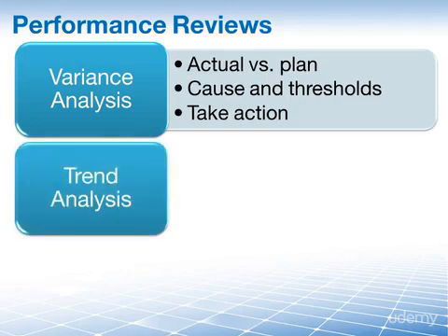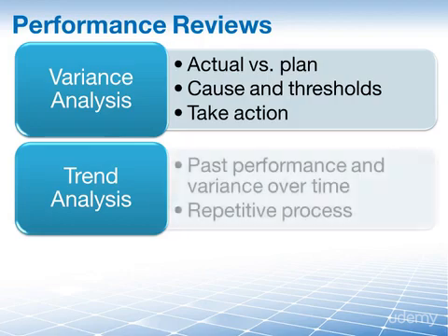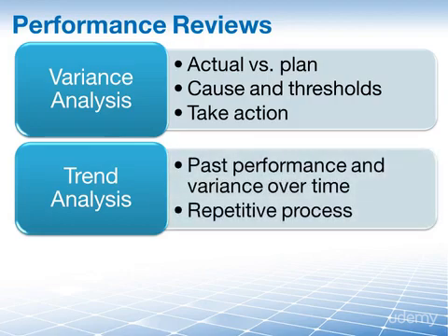As the name suggests, you will look at your past performance to determine what the future will look like, usually using graphical techniques of some kind. But you will also look at your variances over time. Remember that you don't do this process just once. You repeat it again and again. So you will have a list of variances from last week, 2 weeks ago, 3 weeks ago, and so on. That way you can see trends and make appropriate decisions.